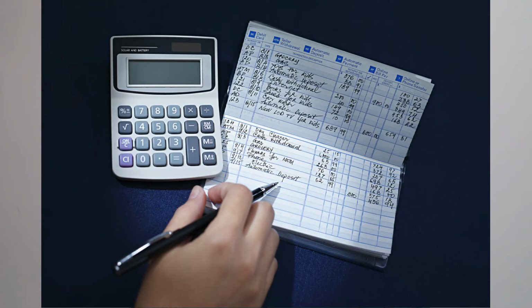However, for most commercial building permits, even tenant improvements, the monthly rent exceeds that. The economics of doing this can easily pencil out in favor of the end user, and if it's successful, it can be a dramatic saving. So putting $2,800 into an expediting cost and saving a month in the permitting process, and a month of rent at $4,000 or so, the numbers are there to support it, and this works quite well, although it's not